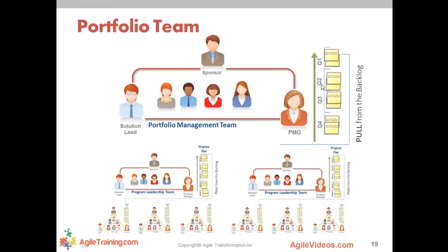In Agile, we welcome change. Change is the norm. Change is not the exception, right? And we believe that as long as you slice things into smaller chunks, and the team's going to pull the top item, feel free to continue to change the bottom part, right? Move your deliverables up and down based on your priority. But once a team pulls a small deliverable, it would be great if they could get the focus to actually finish it, so they're not starting more than they can actually finish.